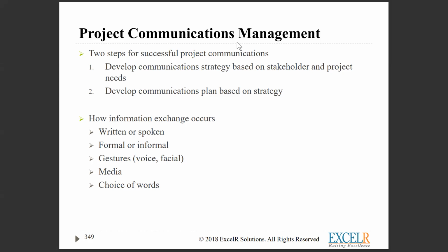Saying that you communicate, but I got this, and then what will happen? One is the scope creep will happen, and then your financials will come into the picture. You are loading your resources, asking the resources to work more, since you went and accepted from the stakeholder, and you have not communicated to your management.